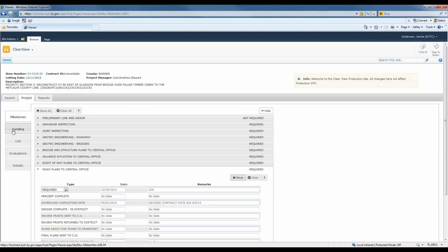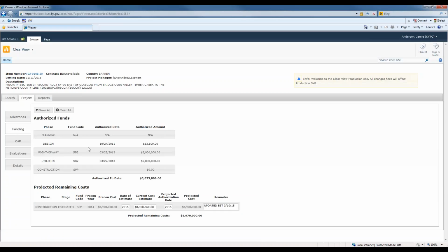So let's review the funding tab. Earlier I mentioned that there were two tables on this tab. You have your authorized funds and you have your projected remaining costs. The authorized funds will show all the phases that have been authorized, and if a phase has not been authorized, the authorization date will be blank and the amount will be 0. So if you recently had an inspection and the cost estimate has changed, you'll go down here to the projected remaining costs and update your estimate.